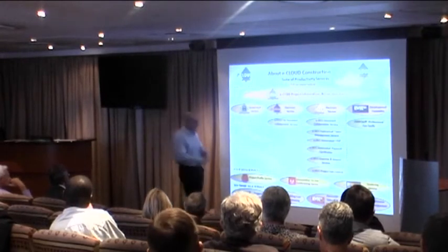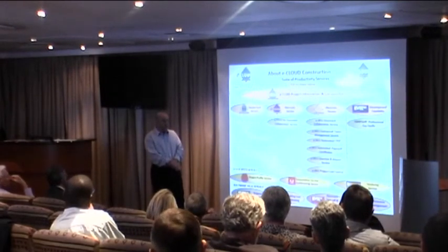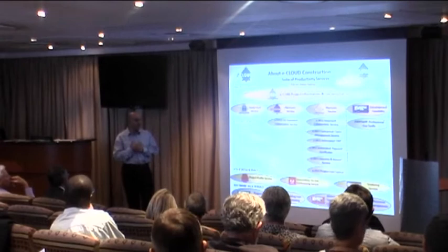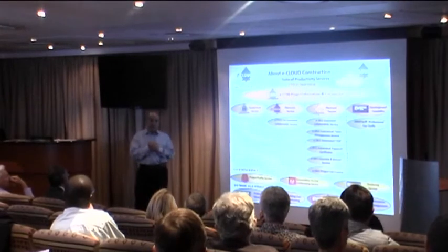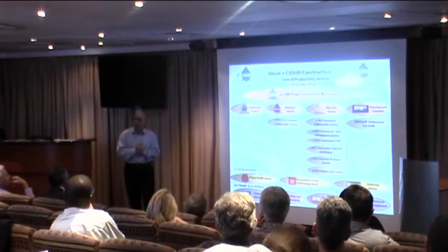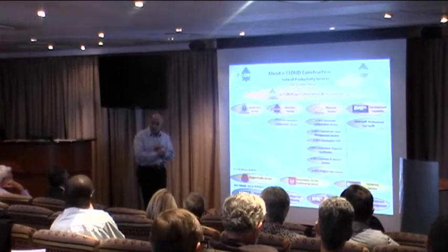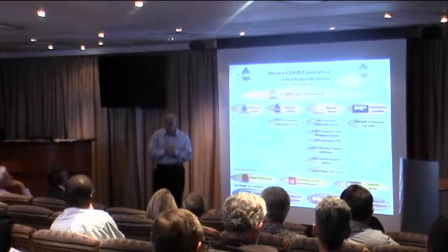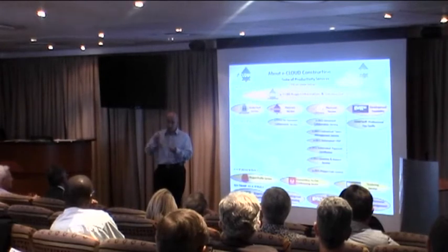Your quantities then feed into the estimating system, which is QuickEst. It has a library of materials and a library of rate build-ups set into the system, and very quickly measures on an elemental basis whatever you're trying to measure. So if you're measuring a house, you would feed in the length of linear foundations, and the system will calculate right the way through to producing a builder's bill of quantities for you, to how many pockets of cement I need to buy, how many cubes of sand I need, how many liters of paint I need, right the way through to how many kilograms of nails. So it's a system that generates material quantities and a builder's bill of quantities.